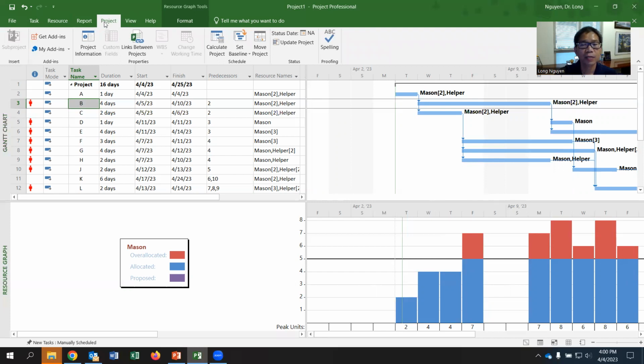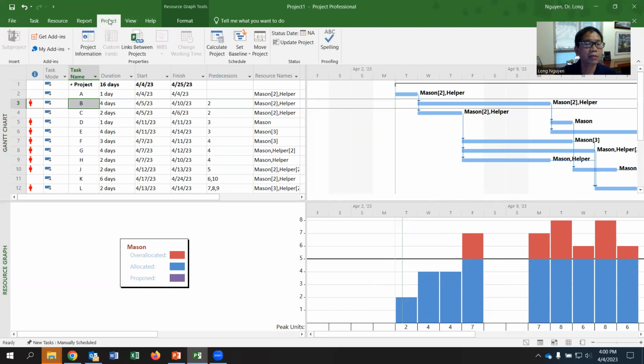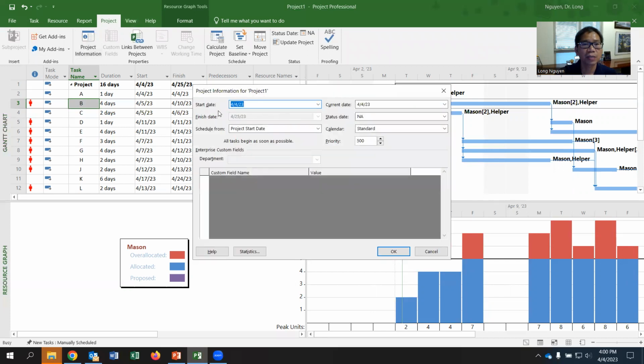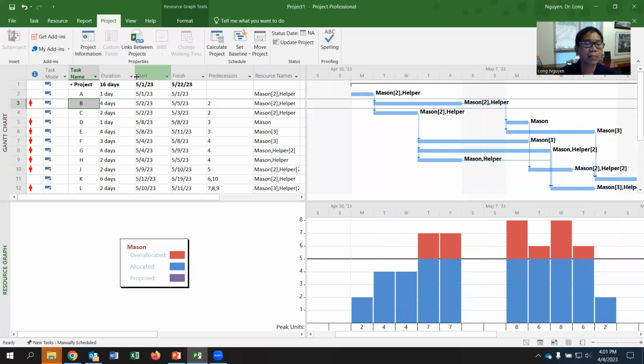If your project starts today, I put it today, but if you can start anytime in the future, then you can go to the project tab, project information, start day. That is today, the day I recorded the video. You can start a month later. For example, here, May 1st, and then select OK. So your schedule will move and start at May 1st.